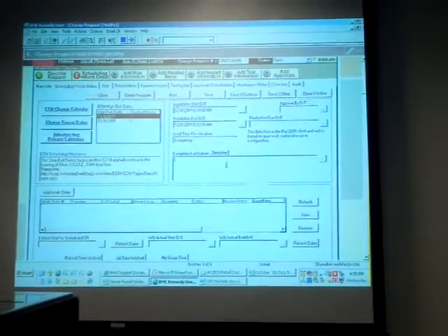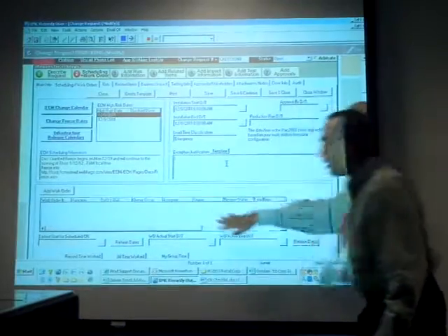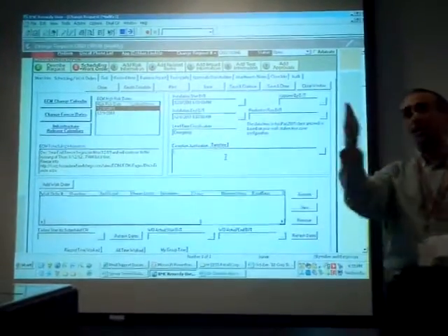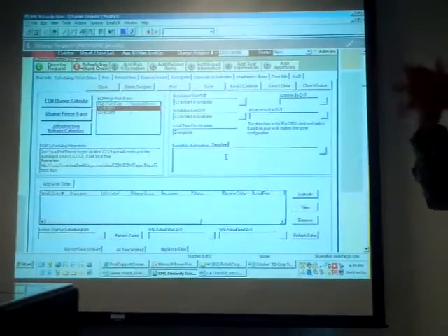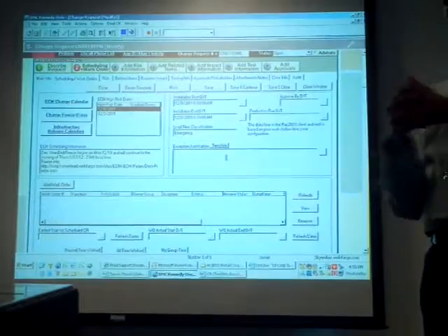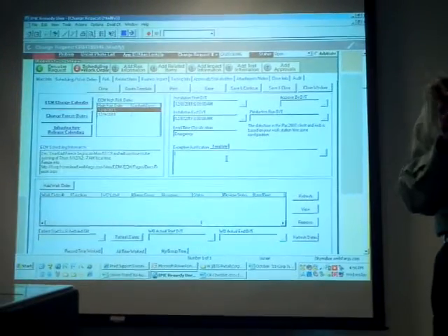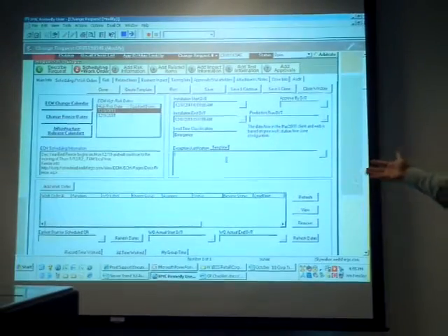So what was our rule as far as something in the future? What do we do here? Work order. Yeah, so just add a work order if it's something in the future. Again, it's a determination: is it 1 hour later on? Make that judgment call. Do you really need a work order? Well, if it's after an hour, maybe not. It's future, but maybe not. If it's 2 days down the line, attach a work order to it.